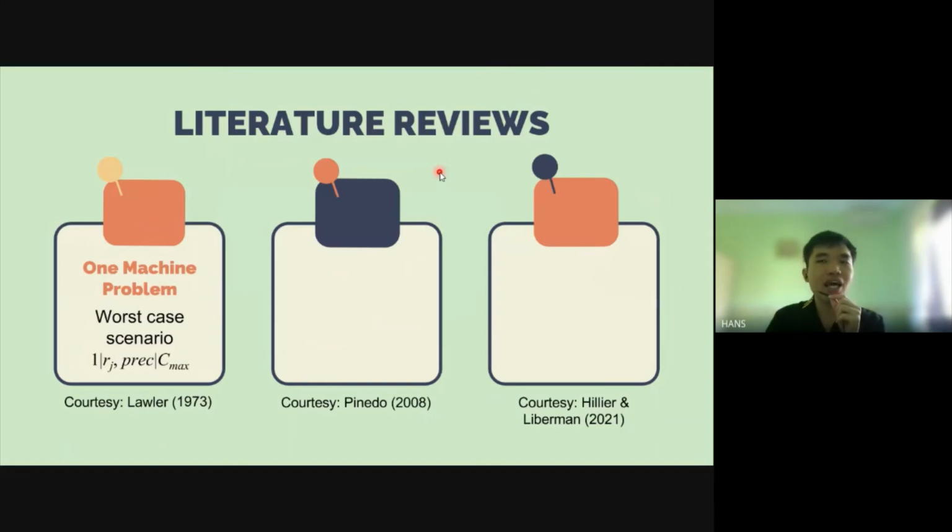Let's say the most simple one: if we only have one machine to finish the job, then the problem is relatively simple because we use the one machine to finish the entire jobs. The drawback of the one machine problem is that, although it is monetarily efficient, we cannot ensure the total time, because it might exceed the duration demanded by the users.